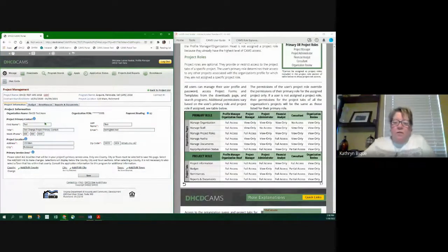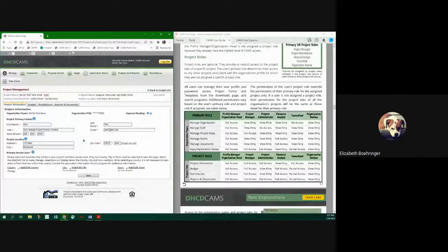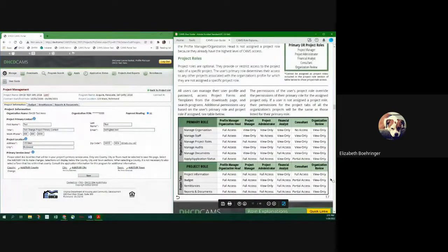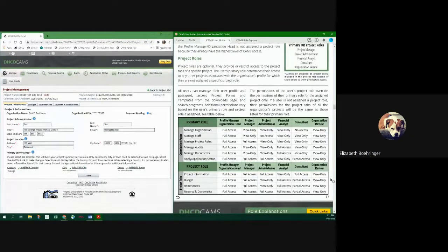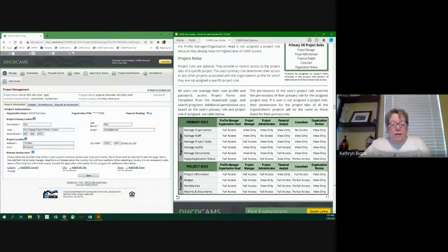Well, can I ask a question? Because I have a situation with one of my grantees where the PDC is the project manager and does most, all the work and needs access to, what is it? Do the budgets, remittances and whatnot. Well, they have access as a consultant. They can do everything except hit the submit button. So they can go in and they can upload the budget. Got it. But if you were, for example, going to do a compliance review and you discovered the consultant is submitting things, that would be a finding. Yes, I understand now. Thank you.